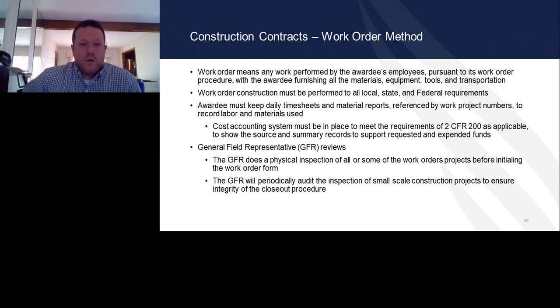Work order. Second, work order means any work that's performed by the awardee's employees pursuant to work order procedures, with the awardee furnishing the materials, equipment, tools, and transportation. Work order construction must be performed to all federal, state, and local requirements.